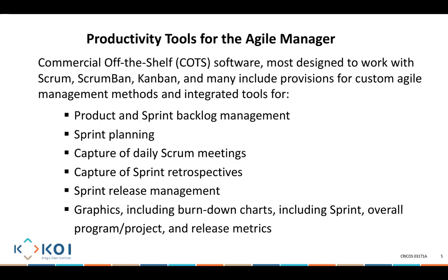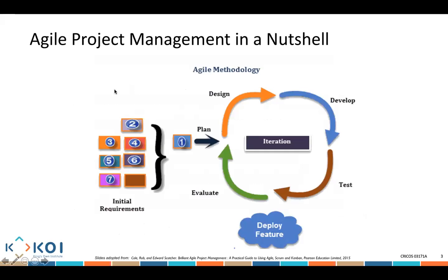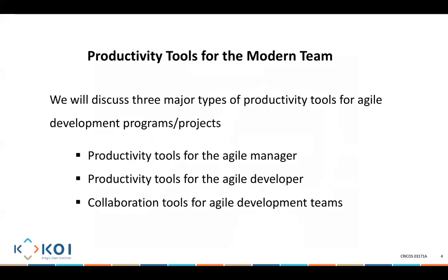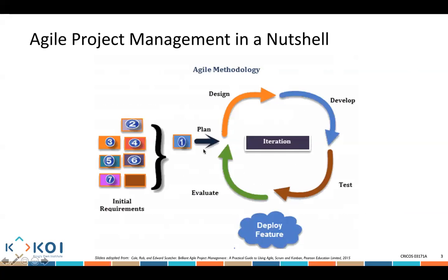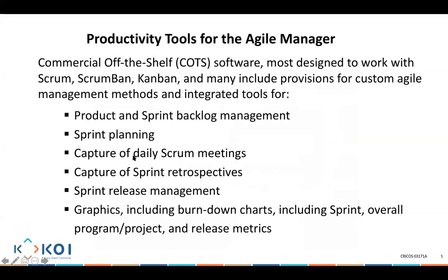The product backlog is what I showed you earlier. I told you we set the priority of all of these items. What is higher priority? What is lower priority? We start making the changes. So you look at your product backlog and you say, okay, now I'm going to work on a sprint backlog. The sprint backlog is this item here. What am I working on in this iteration to be able to deliver to the client? To know what I'm working on, I need to know which one is the highest priority at that particular point in time. And that's what goes into my sprint backlog.